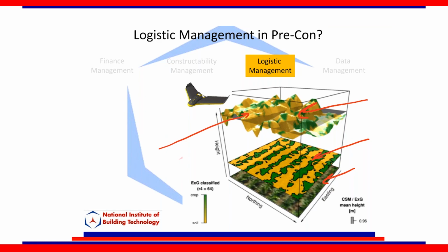And what civil engineers are doing is they'll go in and take this point cloud and create an analysis of how much they're cutting, how much they are filling, and based on cutting and filling, what is left over, and where will they put the leftover material. Then they have to find some other spots to put that material. What kind of material is coming out? Is it high grade? Are there any trees involved?